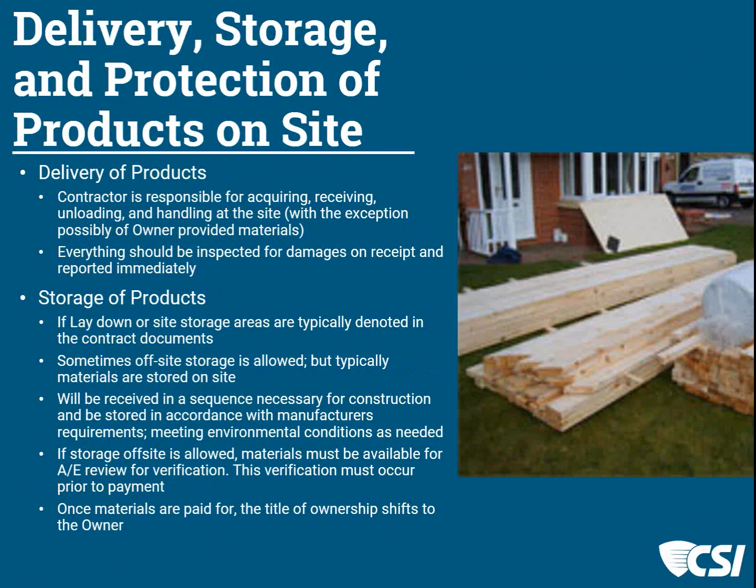So let's talk a minute about delivery and storage of products that we're going to use on the site. This is spelled out in great detail within the specification sections. Delivery of the products is one component, and the storage of those products is yet another. So first of all, it is incumbent on the contractor to acquire, purchase, have purchase orders, receive, unload, and have at the site ready for their use materials as they need them, with the exception of anything that might be owner provided in the project. These materials should be free of defect and damages, and they should be ready to use or rejected, and that notification gone back immediately to the provider.